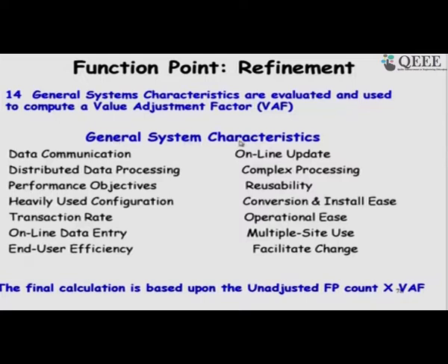The characteristics he considered are how much data communication is involved, whether there is distributed data processing involved, what about the performance constraints, how many configurations exist, what is the transaction rate to be supported, how is the online data entry done, is it a GUI or just a text input, end user efficiency, online update, complex processing, reusability, will the code be produced only for this application, or do we want to write code which will be reused in other applications as well.